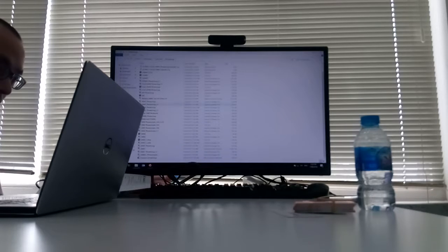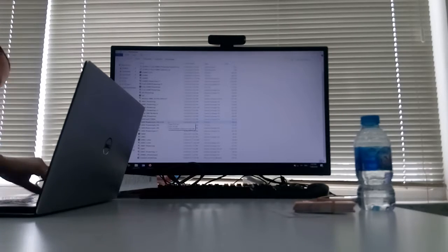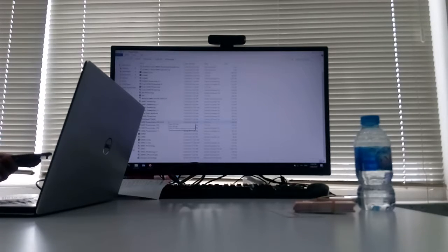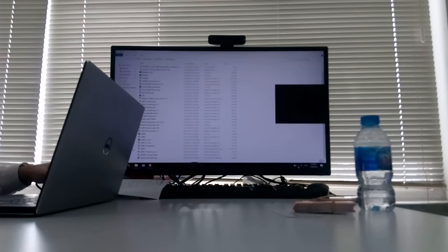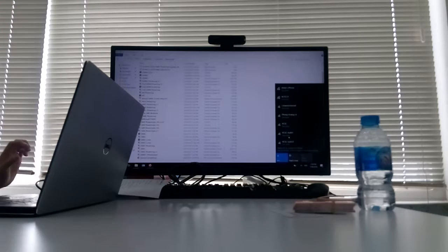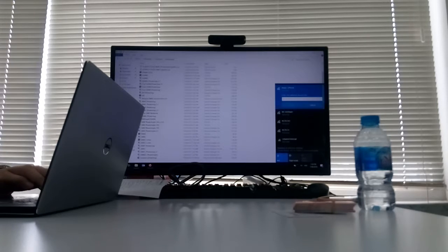So why POMI are you using? Just for lack of anything else. POMI is something we've historically used in Vietnam because the contractors have been less sophisticated. It's simpler for them to price. We did a test of price measurement using POMI, and an old SMM7 I did from the UK, and I got contractors to price both. And actually, because they've got line items, they didn't understand it.